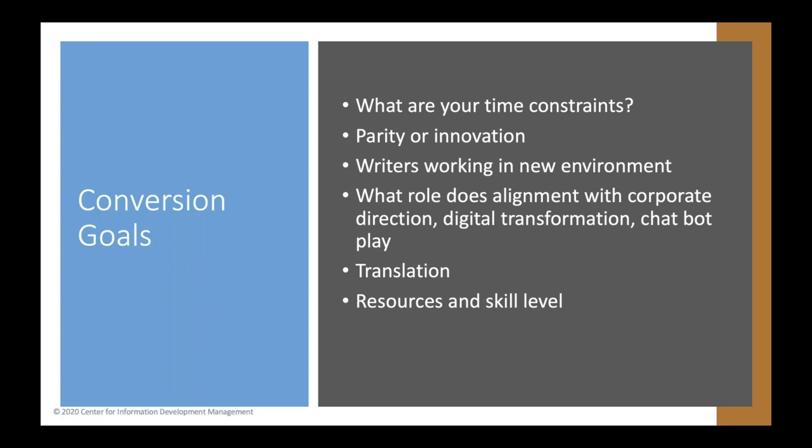The first thing you want to define are the goals for your conversion. This entails coming up with some specifics about what your primary driver for the conversion is. Is it to reduce translation costs? Is it to facilitate reuse? Is it to provide a consistent experience to your users? What are your time constraints? Having a tight timeline for conversion means that you're likely not to have enough time to do very much cleanup before the conversion occurs.